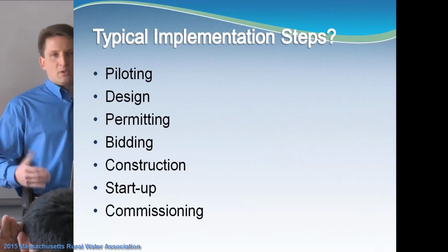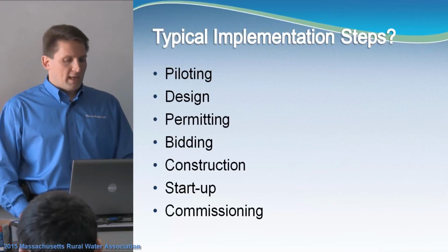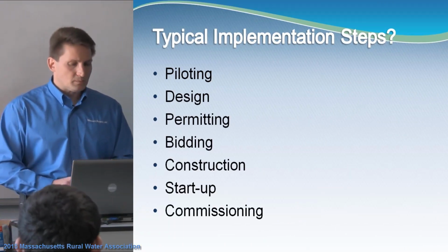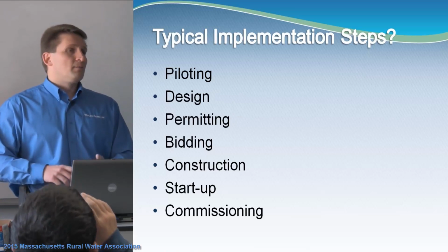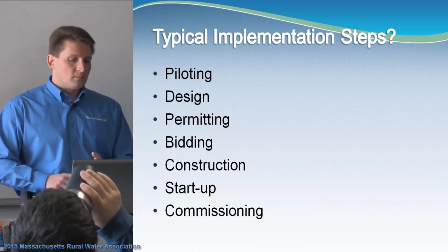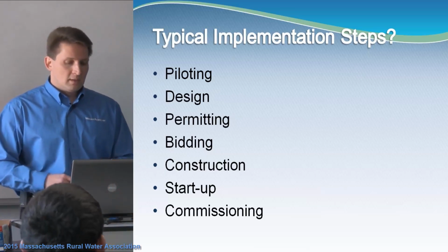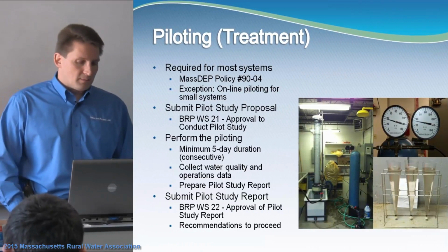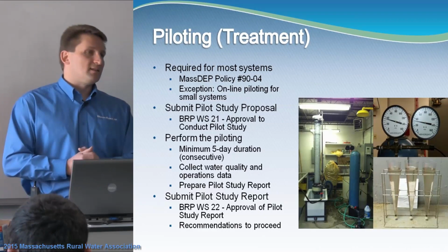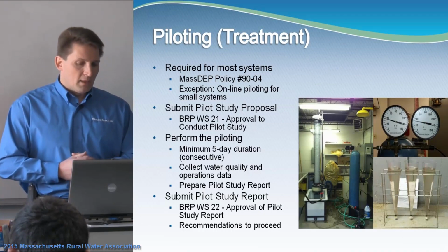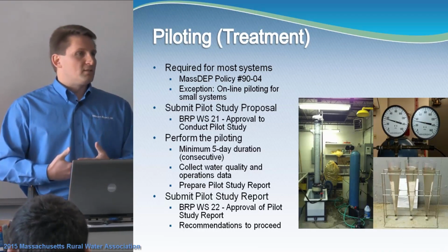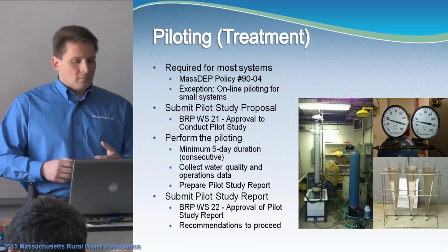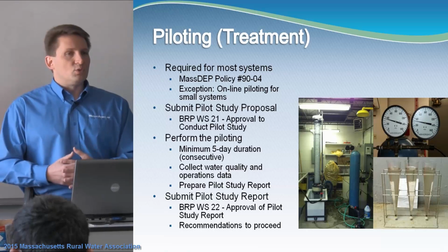Typical implementation steps for implementation of treatment would require some piloting, as we alluded to. The design, typically have to go through permitting, bidding and construction, the startup, and the commissioning. It is required for most systems. MassDEP does have a policy, number 90-04, which talks about what you need to do with piloting, what types of samples you need to do, how long it needs to be. As I said before, most of the systems do need to pilot.